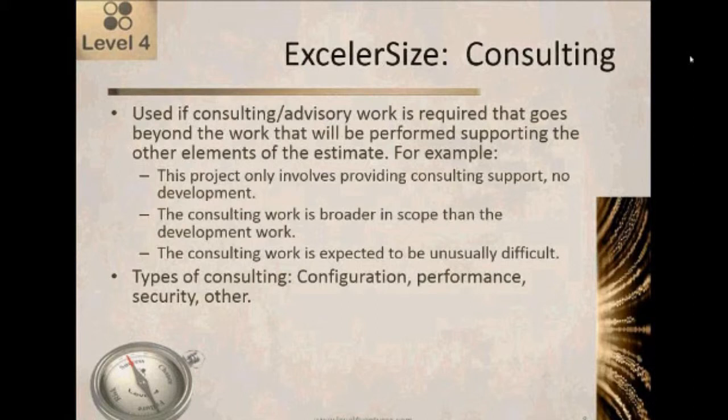Second example would be the consulting work is broader in scope than the development work. So that might be a situation where we're getting in there and we're adding a couple of new reports, but they say, oh, and while you're in there, we'd also like you to look at the way we're doing sign-on and user authentication. So that's a security consulting kind of piece of work. It's broader in scope than just the reports that we're estimating separately.